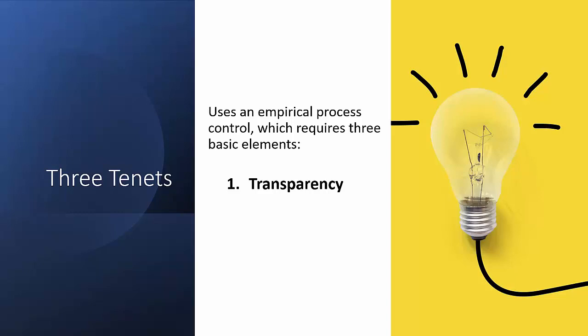As you can see, this completely goes against the idea that there is no reporting. On the contrary, we have dashboards, which we call information radiators, and these are visible to all, and it needs to be completely transparent. The second key tenet is inspection. As you proceed, the work that is being performed needs to be inspected frequently. The deliverables are inspected, but also the product backlog and the priorities of the activities that are still in the backlog need to be frequently inspected.